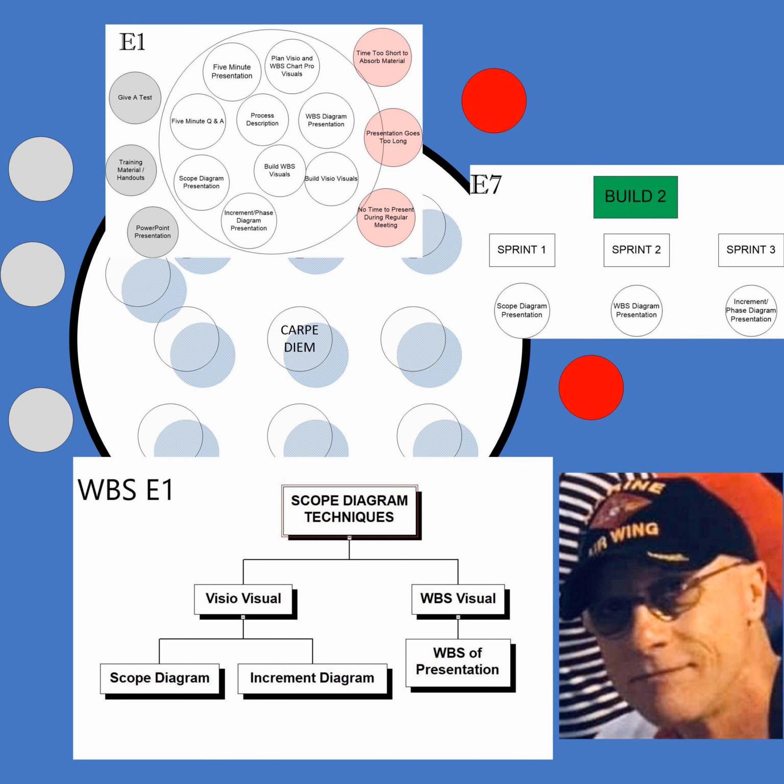So you had in there the folks who were going to turn it down and be at the current data center, the folks who were going to meet you at the new place, and their names, their numbers, their emails, how to get in touch with them, and then a list of their procedures.